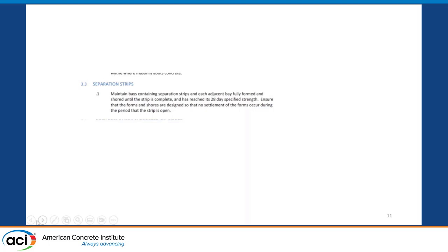Here's an example of a limitation on stripping shores between a construction joint. The specification says you can't strip this until you've got 28-day strength. They haven't given the option to the constructor or the engineer to say maybe we can look at a solution that increases the strength, or add a little more rebar in that joint to transfer the load, which would give the opportunity to strip forms earlier and not tie up the whole area — usually all the way up the building at an expansion joint. It doesn't give the latitude to have an option.